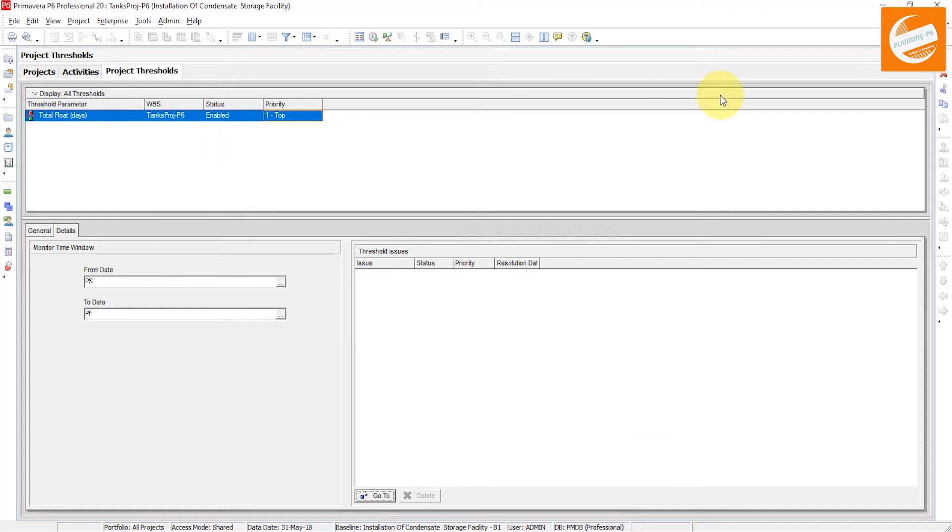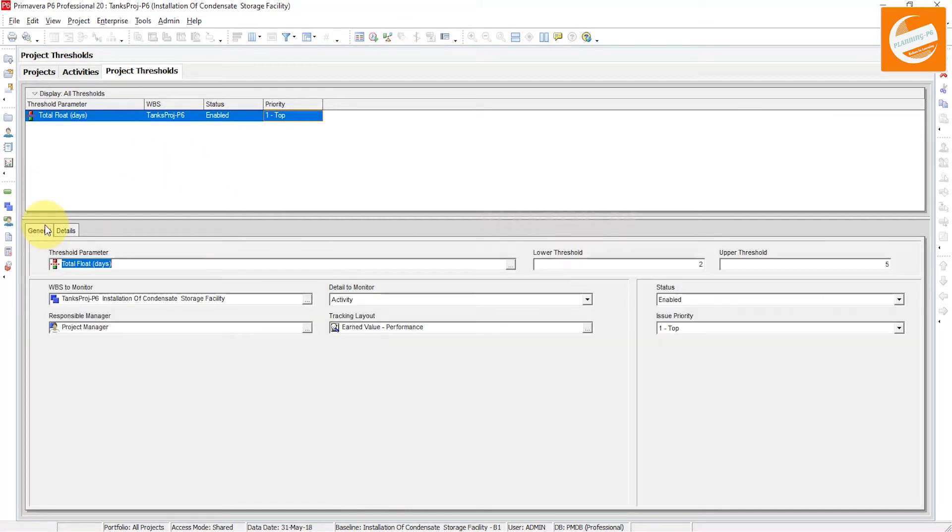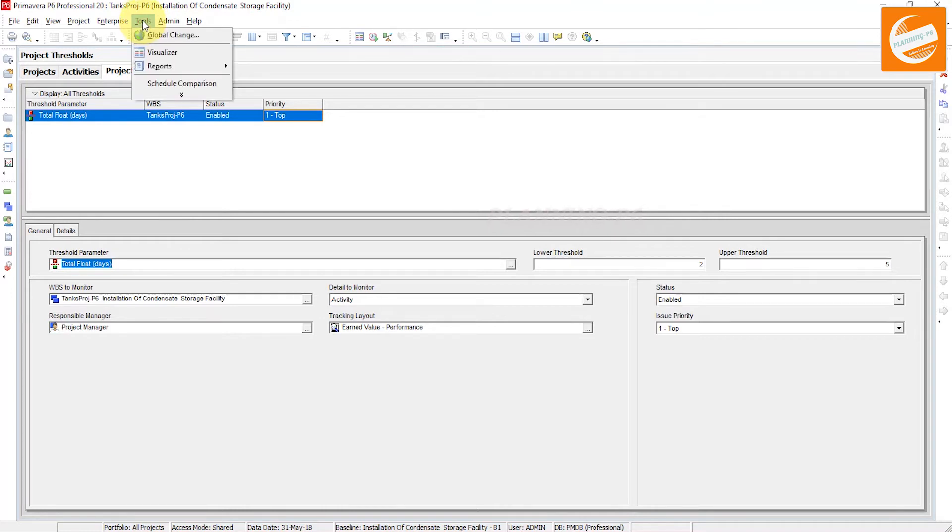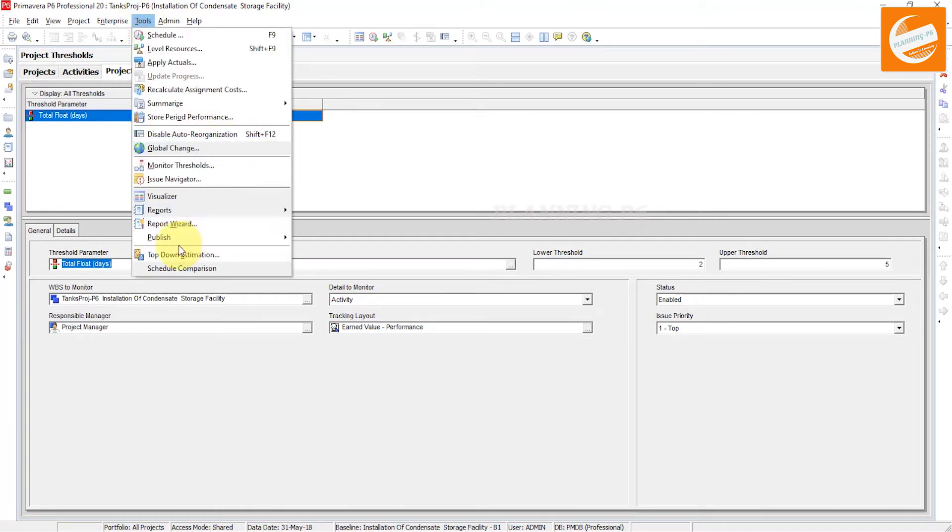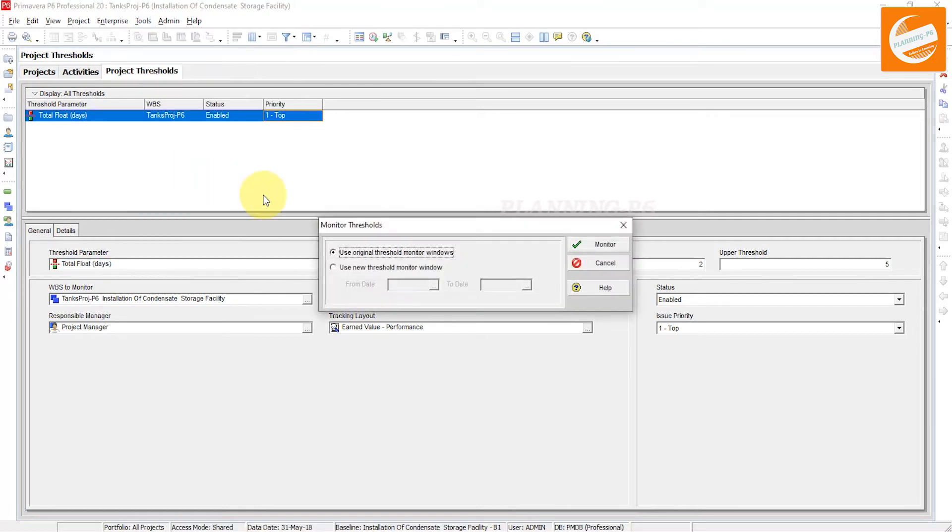Also, you can add more thresholds. You can assign the thresholds to each activity or to WBS as well. And now our threshold has been assigned to one of our activities or WBS. How can we monitor that? Go to the Tools menu, and in the tools tab you can see here the Monitor Thresholds option.